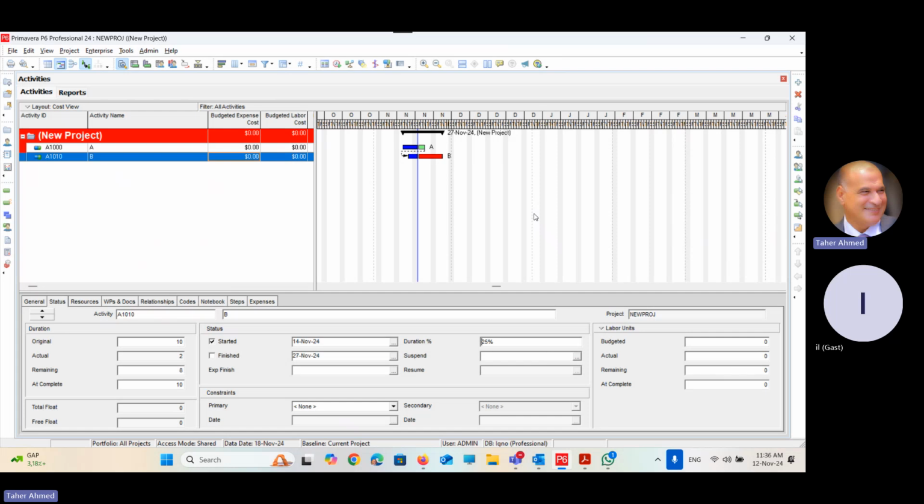So usually owners use return logic. You're like, we agree about the logic. We set it in the schedule. So during the schedule, only keep the logic, not progress override. The contractor has a debate. You're like, but for some reason, I was able to start the activity without completing it. I make overlap to accelerate the work. Why are you not calculating the progress? It is a debate not answered yet, not resolved till now.